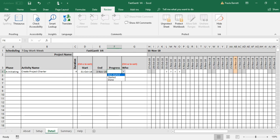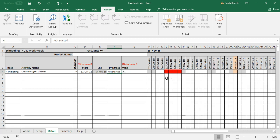So let's just say we're putting this in and we'll say it's not started. Now notice that it turns immediately to red. And the Gantt chart bars are on a color code of red means we're not good, yellow means caution, and green means good. And so this is an issue and really the reason why it's red is because today is November 16th. We have a task in the past and it's not done. We should have completed that November 3rd.